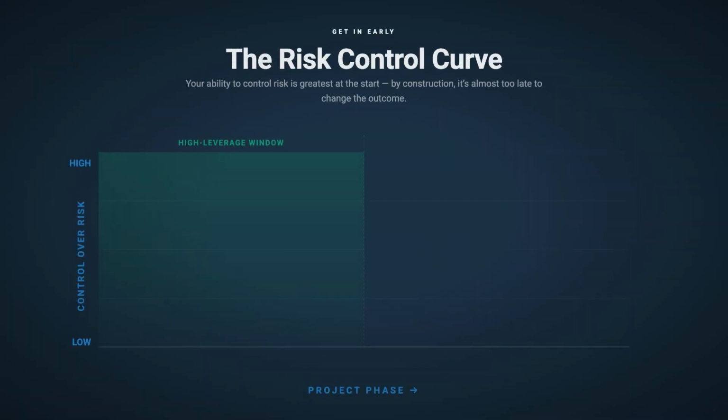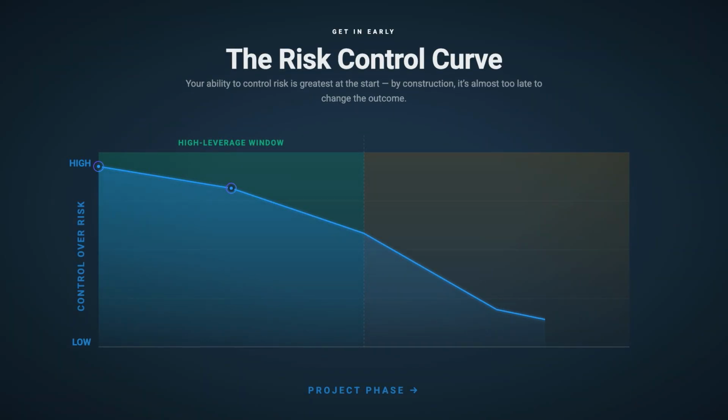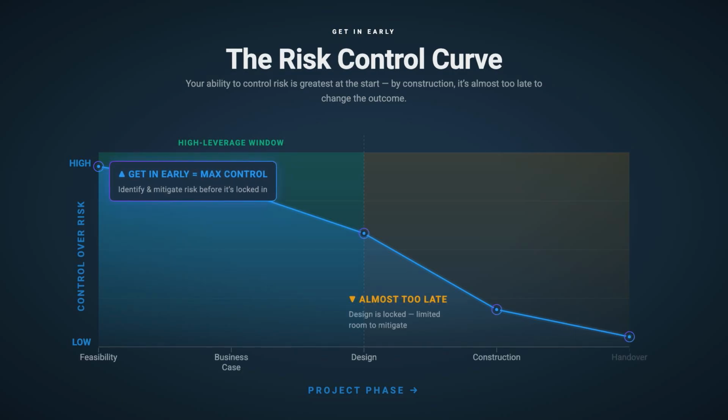That's where we can have the greatest control over risk, going back to that knowledge of risks and how to mitigate and manage them. That's best done in the early phases of the project. Once you get to construction, if the design's done, if that's not capturing and mitigating some of your risks, it's almost too late to some extent. The earlier you get in, the earlier you can identify those risks, you can mitigate or minimise those risks as you move through the different project phases.